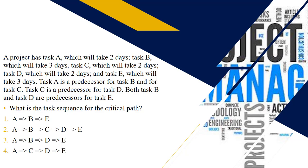Make sure you are well versed in the critical path — you will see questions about it. With this specific question: a project has task A taking two days, task B taking three days, task C taking two days, task D taking two days, and task E taking three days. Task A is a predecessor for task B and for task C. Task C is a predecessor for task D. Both task B and task D are predecessors for task E.